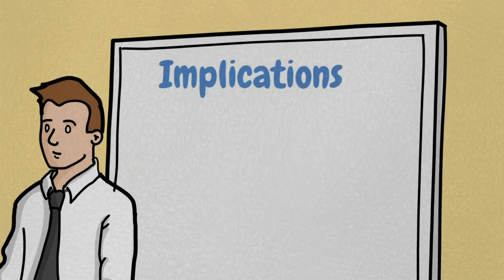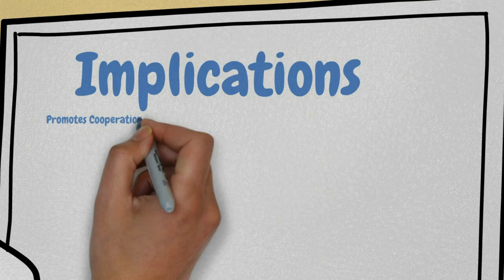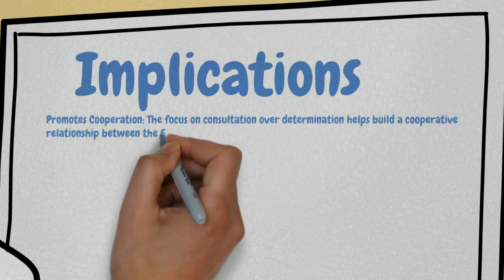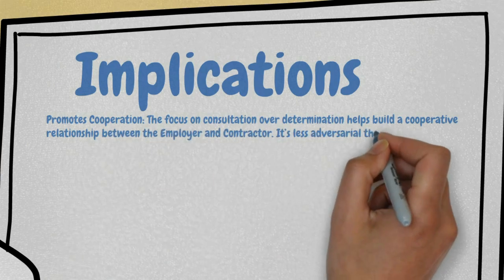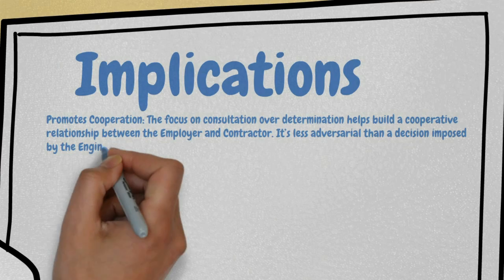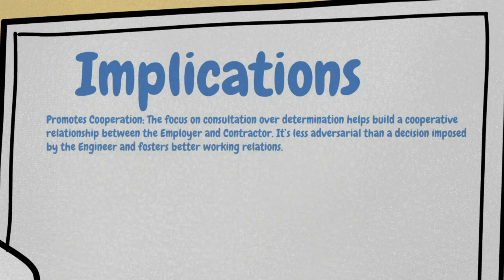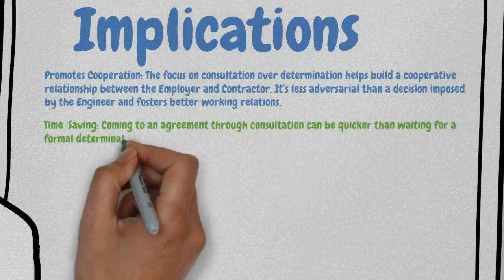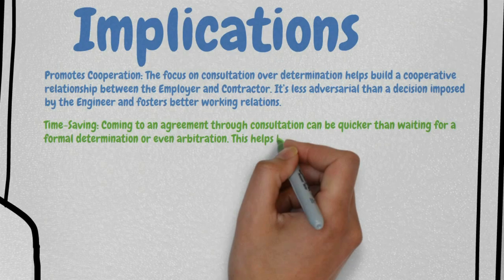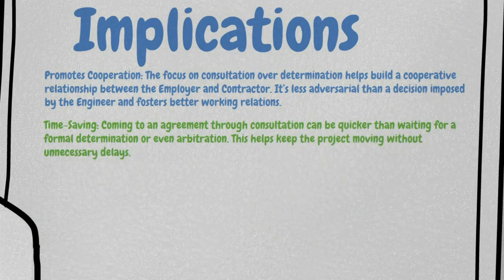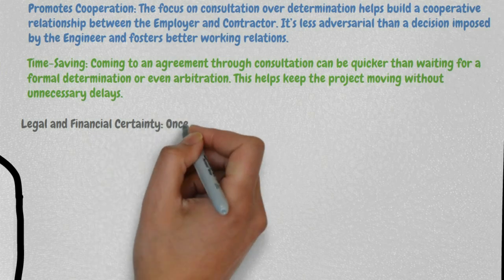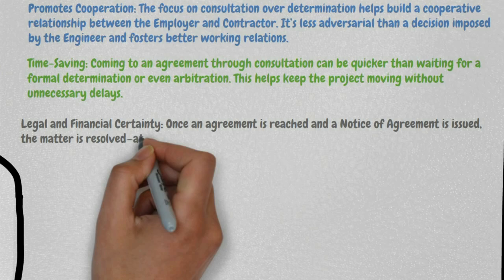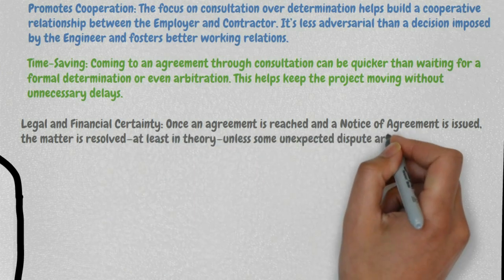Implications of this clause. First, it promotes cooperation — the focus on consultation over determination helps build a cooperative relationship between the employer and contractor; it's less adversarial and fosters better working relations. Second, it saves time — coming to an agreement through consultation can be quicker than waiting for a formal determination or even arbitration, keeping the project moving without unnecessary delays. Third, it provides legal and financial certainty — once an agreement is reached and a notice of agreement is issued, the matter is resolved, unless some unexpected dispute arises later.